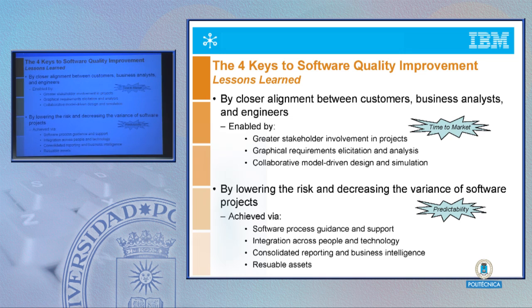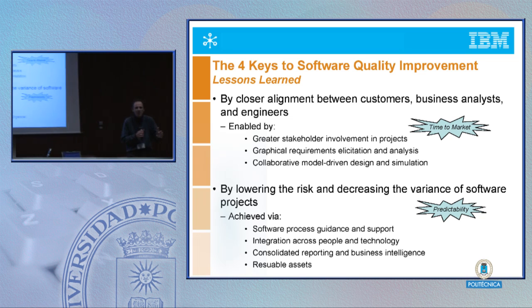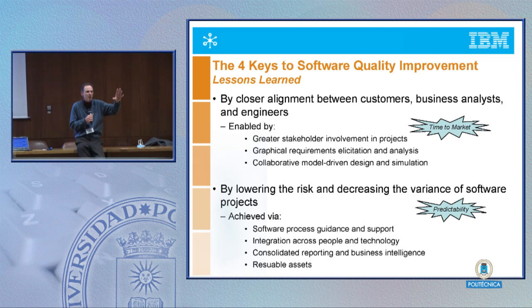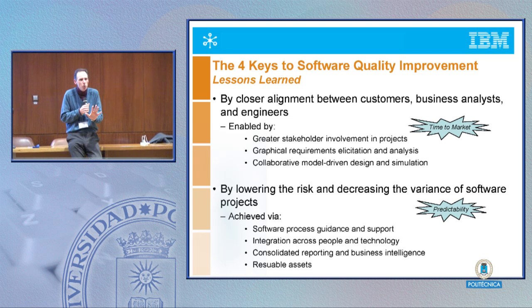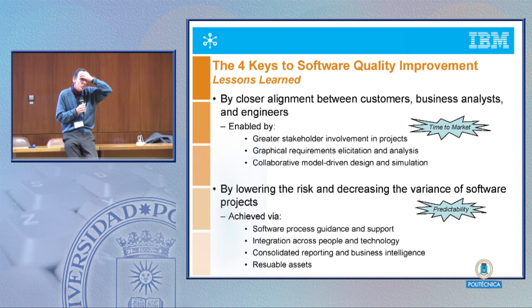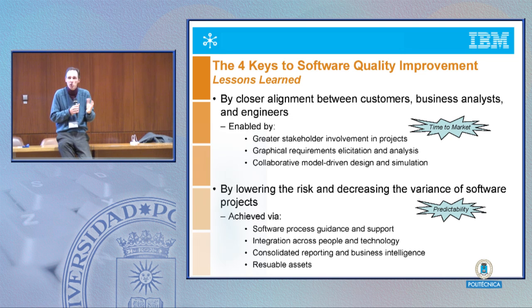So if you go back, you know, everybody says, yeah, but we have COCOMO and Barry Boehm's work on those models and Capers Jones. We've got a lot of statistics now. If you go back and look at COCOMO, I think it said something like, these numbers come from a series of projects, and 50% of the time projects follow these profiles about 25% of the time. There's a huge variance in the data that is used in models like that. So they give you an indication, but they're not very useful in pinning down what happens in your particular context with your projects. So getting data around that becomes really critical.